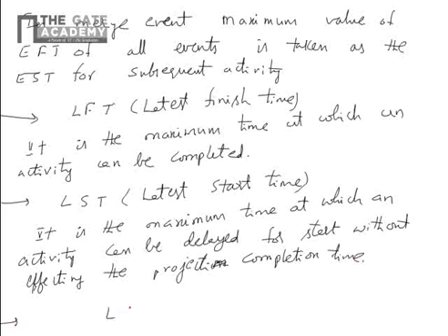Next is LST is equal to LFT minus duration.